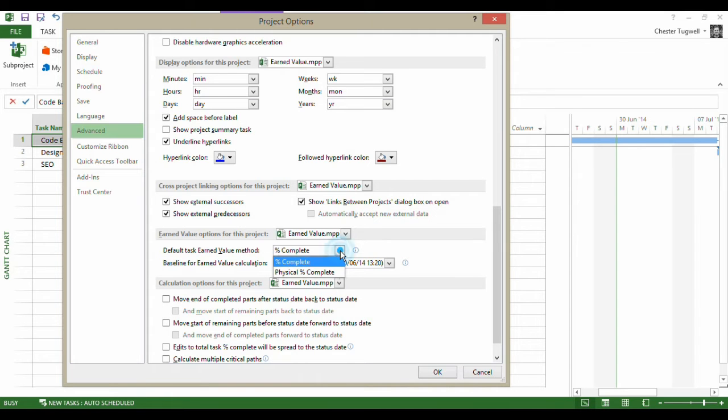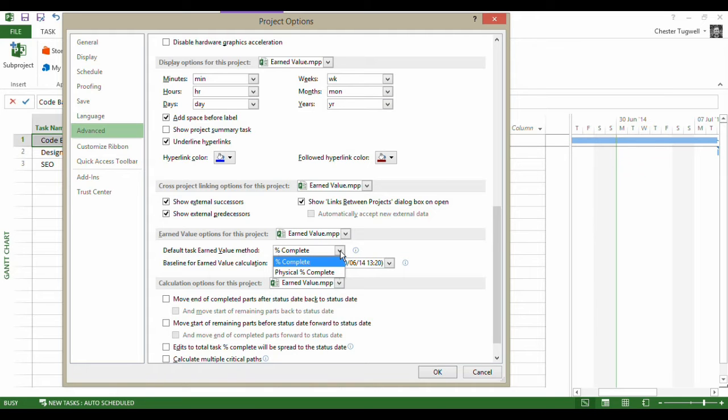Your other option is physical percent complete. So if you were making a product and you wanted to say I want to base my earned value method not on the percentage of the duration of the task, but on the percentage of the actual product that has been made up to the state of date, then you can choose physical percent complete.